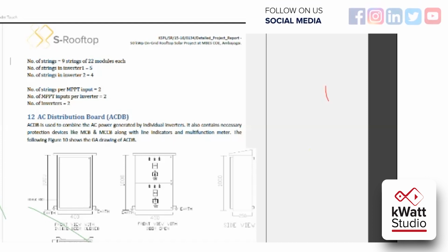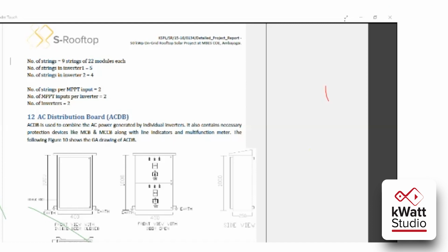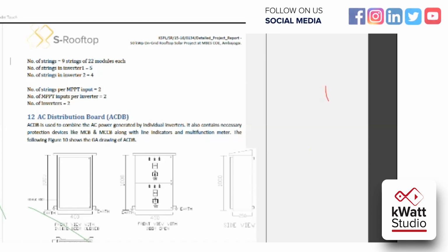After that, you have to add the timeline of your project, how you have executed your project in the past, in number of weeks, number of months, number of days. You have to mention each and everything from the designing and engineering to procurement, procurement to your solar structure mounting, solar structure, solar foundation erection, then connection of all the components, then cable laying, cable connection, DCDB, ACDB connection to commissioning. All these details you have to mention in your timeline. It is nothing but the track of your project, keeping track of your project.